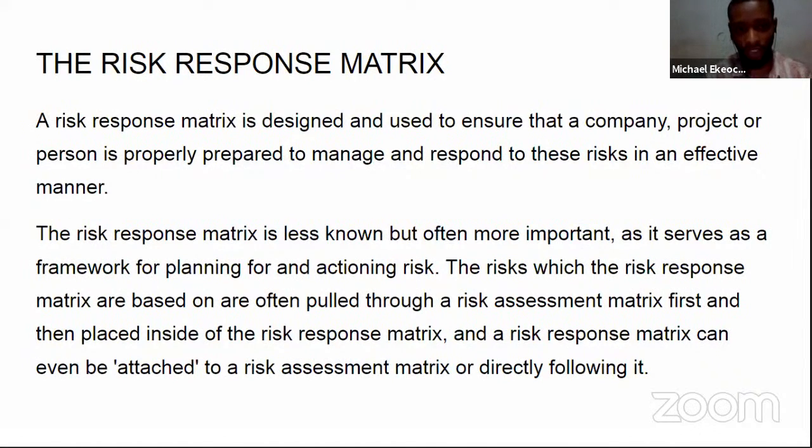When you've identified a particular risk and you know the strategy that you want to adopt to address it, you assign a risk owner or a risk manager, someone who is responsible for taking care of that risk. You put this all in the matrix so that the plan will be clear, so you don't have any confusion when you're trying to implement the plan or your strategy.